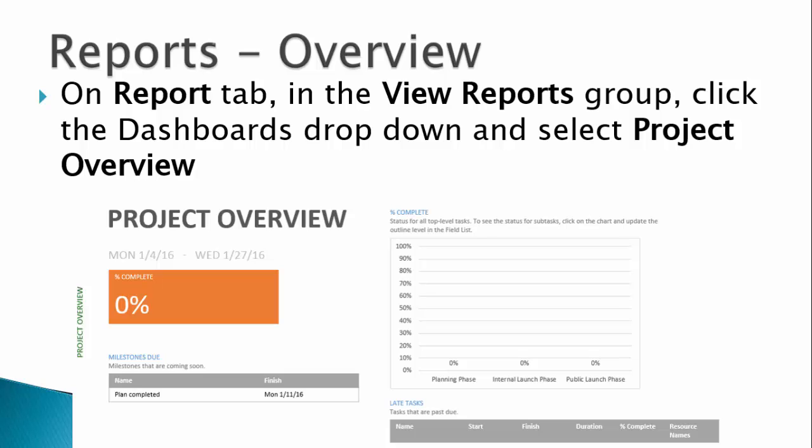A dashboard view, such as this one, is a good choice to review with the project sponsor and other stakeholders at key reporting periods. If you choose your milestones carefully, you will improve the view and show your viewers critical places in your schedule. If any of the percent completed or late tasks values do not fit expectations, this would be a good time to take corrective action if you haven't already identified the need.